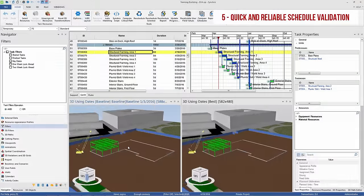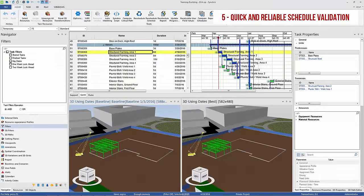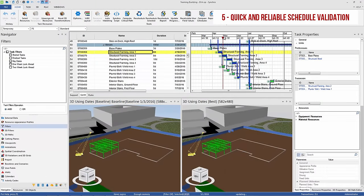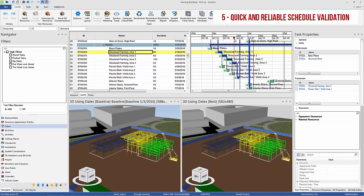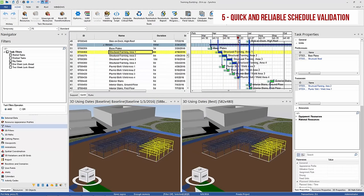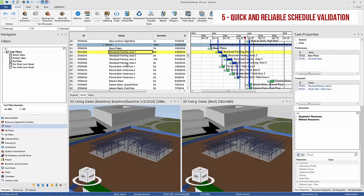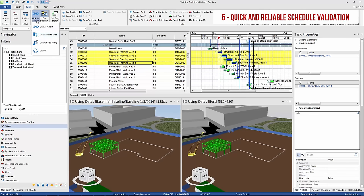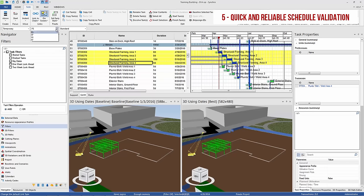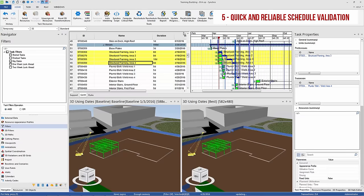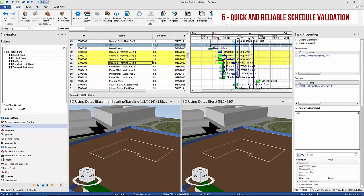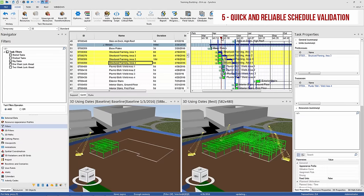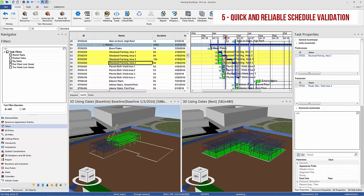As you've probably noticed, one of the best things about Synchro is that you get to instantly validate any scheduling adjustment as you are doing it and even during the initial linking process by simply dragging the focus time left to right. In this case for example, we can quickly see how the project would turn out if we decide to bring in more crews and start work on the four areas of steel simultaneously.